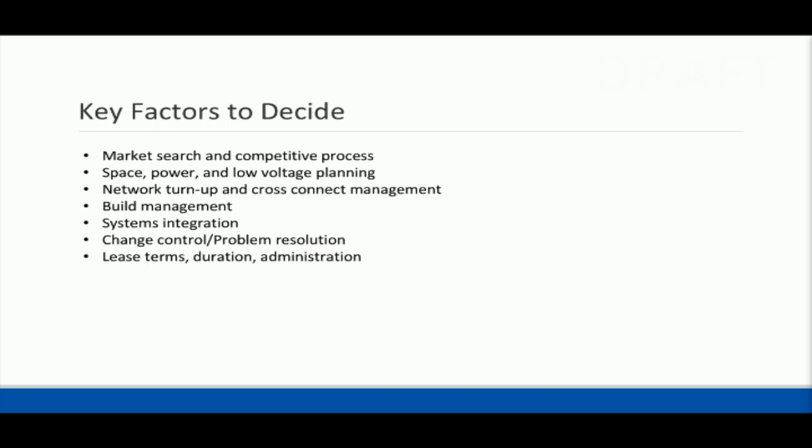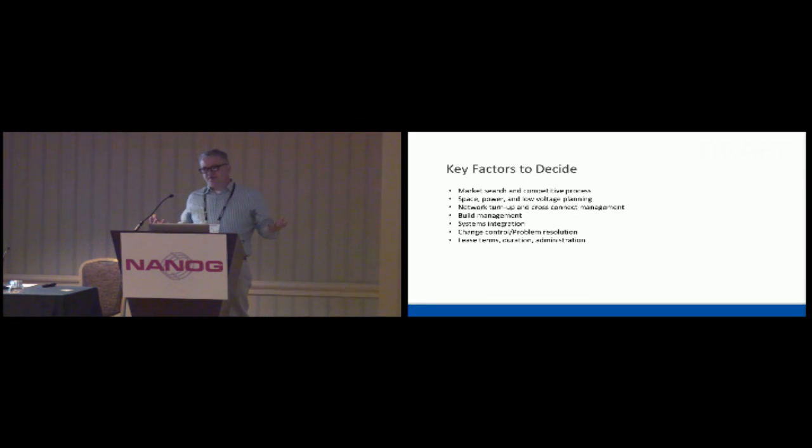The build out of a data center is pretty complicated. People think turnkey data center, it's ready to go. There's a big difference between when you buy a turnkey data center that's there and fully built out and ready for cabinets versus when you go into a co-location facility and you buy your cabinet. There's a lot of stuff: you've got to select the cabinets, you've got to select the low voltage conveyance systems, the cabling. It's all got to be built, coordinated together. Sometimes even that requires a building permit. So there's a design process that goes up ahead of it. So there's a lot to actually fitting up the data center. There's systems integration.